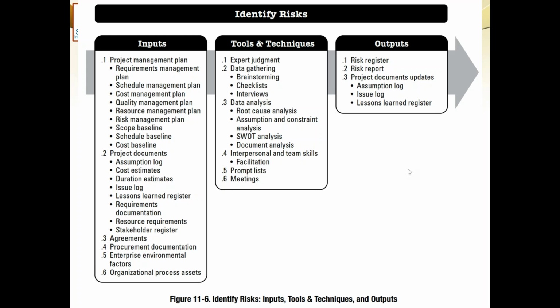Okay, well done. I might have missed some. You see, number one, there is nothing like budget management plan. It is called cost management plan. There is nothing like human resource management plan. It is resource management plan. If we start from the very beginning, from scope, scope has two plans. One is the requirement management plan and then the scope management plan. There are two management plans which are created in scope. Integration is not a plan. Integration is the project management plan itself. The project management plan is called the integration plan, right?